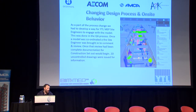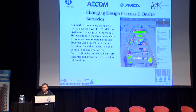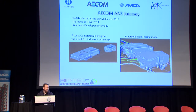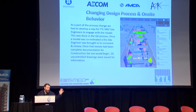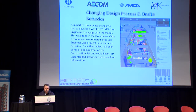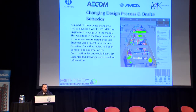We implemented a tool called Reviz2 - quite good, with integrated issue tracking. It was really about getting the site engineers to walk through the models. We'd move things, move things, and then get them in for half a day which saved a week of generating drawings. On some jobs for fabrication drawings, especially the rainwater downpipe which our architects end up doing, the subcontractors would just glue their logo on top of ours - because they were agreeing to deliver exactly what we wanted.